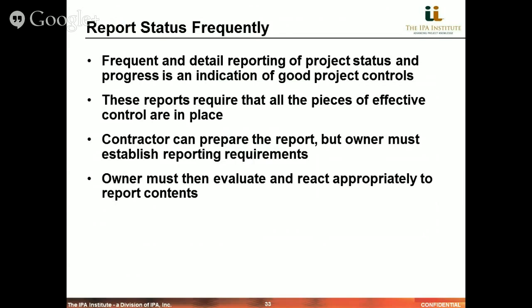Obviously, this report can be prepared by contractors, and that is not at all a disconnect from best practice. But the owner must be the one to establish the reporting requirements and frequency and the information that must be included in these reports. And they must then evaluate and react appropriately to the report contents. The owner must be in a position to digest the reports fully and take those results and act on them based on the learnings from the reports.